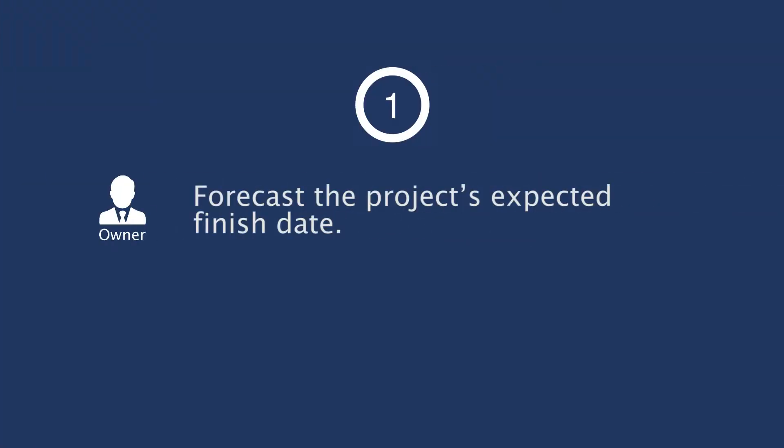Why do contractors and owners alike need scheduling? First of all, owners need to get an idea on the project's expected finish date. Many owners are not informed. I've seen owners who want a project done in four months that actually needs 22 months. So they need to be realistic.